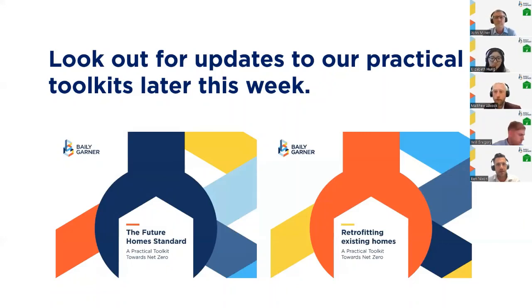Yeah, I'll pick that up. So just to reiterate what Elizabeth said about the de-risking element, you're taking out potentially significant risks from the actual build programme. Clearly any delay or significant issues once on site is going to incur additional preliminary costs and delay costs from the contractor. So it's very much about looking holistically at those risks from the start and trying to remove and reduce them as much as you possibly can.